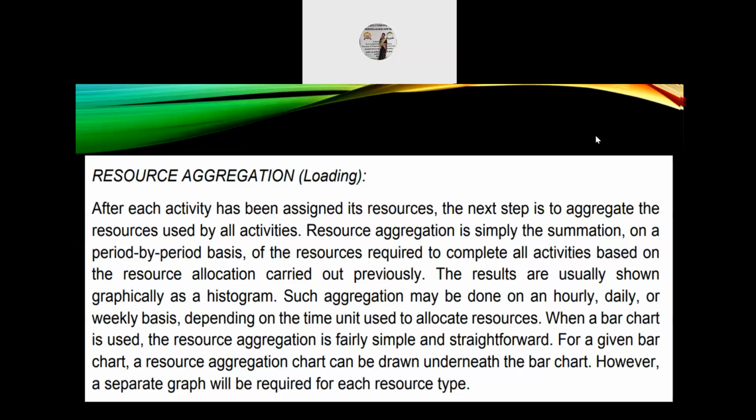So when a bar chart is used, the resource aggregation is fairly simple and straightforward. So for a given bar chart, a resource aggregation chart can be drawn underneath the bar chart. However, a separate graph will be required for each resource type.